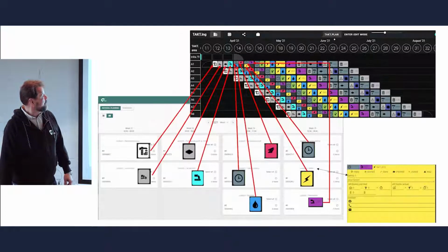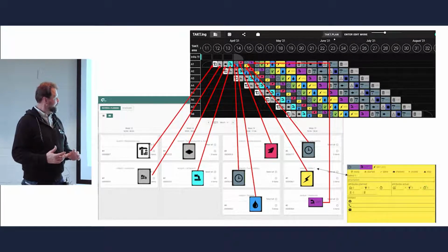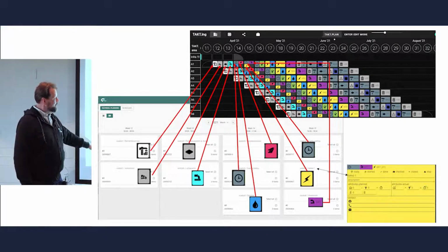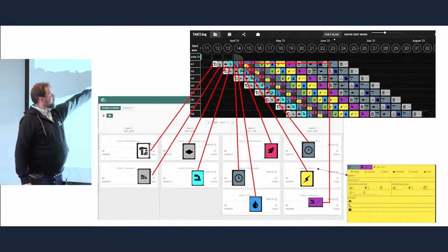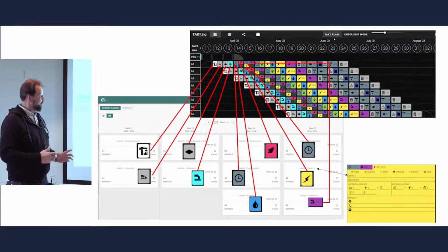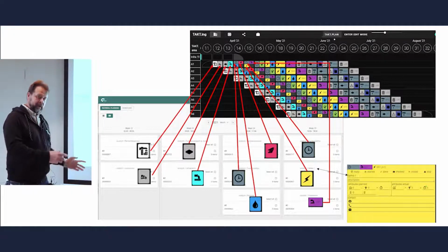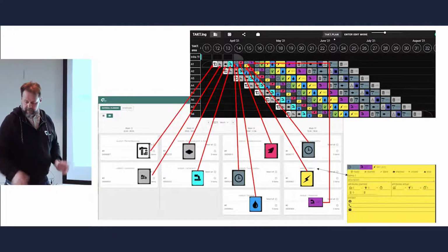So the basic idea of how we are managing the materials in the project industry is that in our digital platform we are connecting the material information to the work tasks. And when we have done this connection, then we are operating the material information from the design, from the BIM models, until the project is delivered. Then we are doing the digital delivery. So it's about material management through the whole project life cycle.